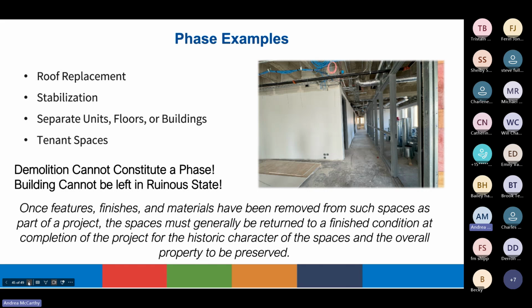This is because the building cannot be left in a ruinous state. You can leave areas of the building alone and still move forward with phased work in other areas, but once you remove finishes and features, you must refinish the space before closing out the phase.